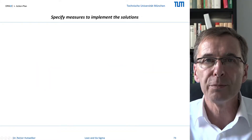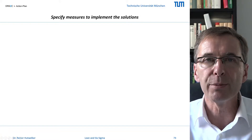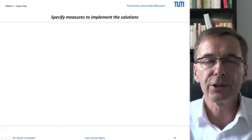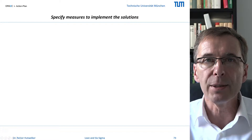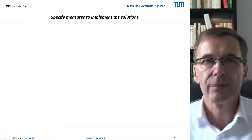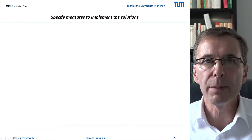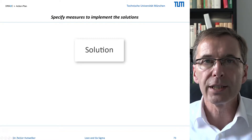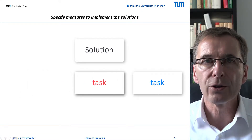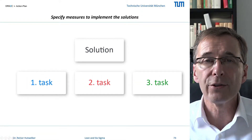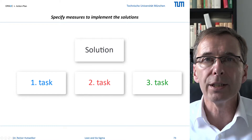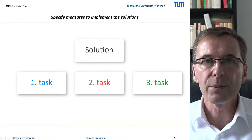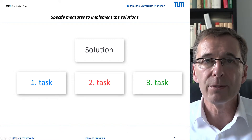An important cause of protracted and late implementation in project management is a lack of transparency, even of seemingly simple solutions. A realistic forecast of the implementation period and the probability of its actual implementation increases if you break down solutions into small work packages and put them in chronological order. That is recommended with any project management. I am still often surprised by the number of specific tasks that result even from simple solutions.